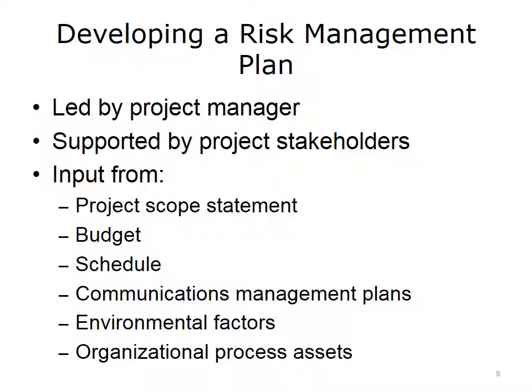Now we are going to delve a little more deeply into creating the project risk management plan. The project manager leads the plan with support from selected team members and other stakeholders with expertise in risk management. You will develop the plan with input from such project documents as the scope statement, the budget, schedule and communications management plans. Consider environmental factors that may have a positive or negative influence on the project outcome, and review any applicable organizational materials, such as documentation that details an organization's typical risk management activities.